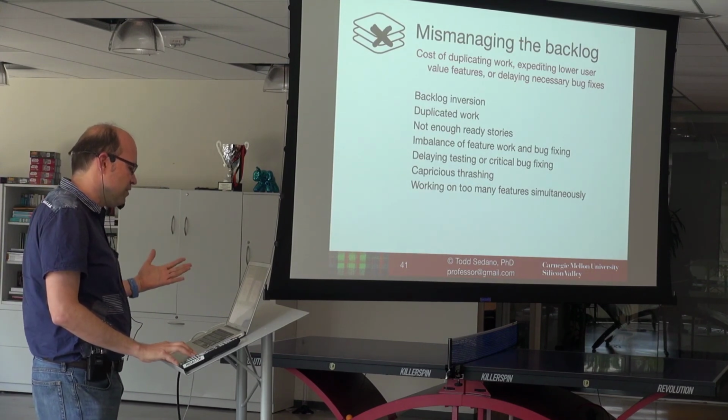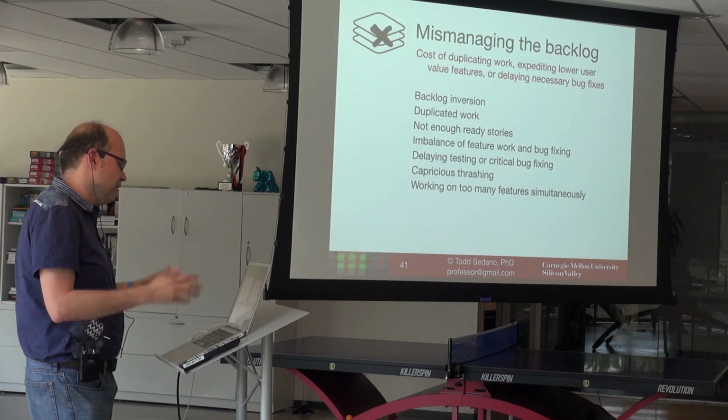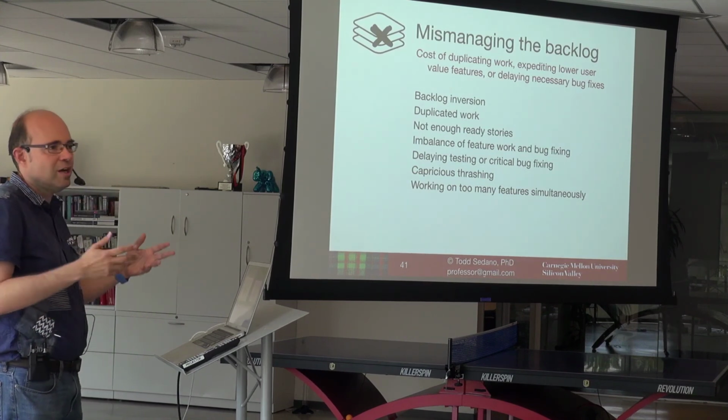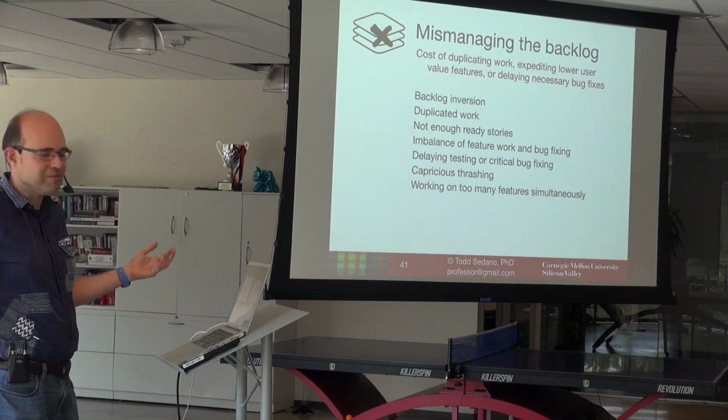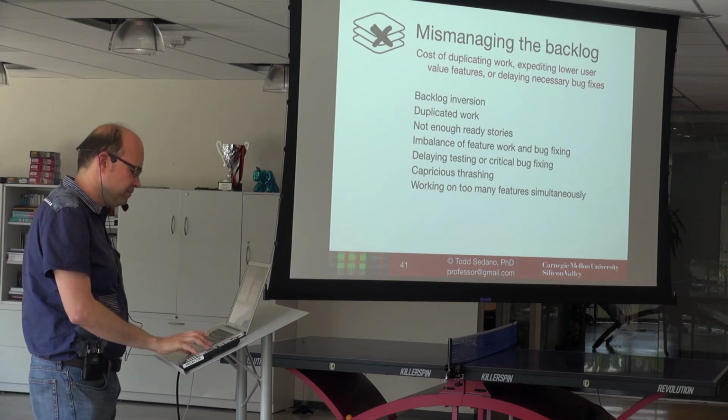And then working on too many features simultaneously. With a big team, you can actually start a lot of different epics and not finish any. And so it's really hard to achieve MVP.